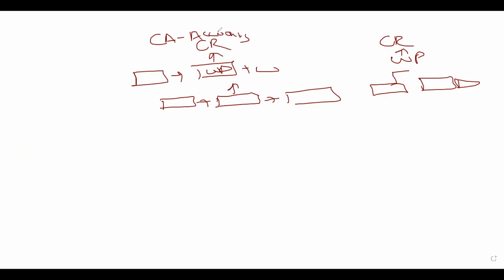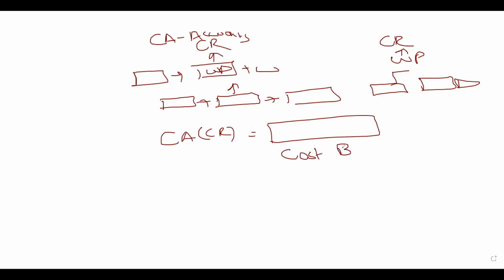So they can do the invoicing because they don't know the names of those things. They work with 1.0, 2.0, 3.0. So once you add all control accounts, which already include the contingency reserve, the amount you get will be called the cost baseline.